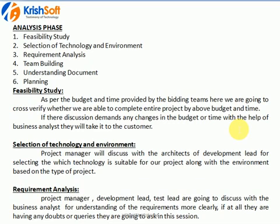Next in the analysis phase is requirement analysis. Once team building is completed, the business analyst explains each and every requirement to the entire team — including the development team, testing team, architects, database team, servers team, and deployment team. Based on this, each team prepares their own understanding document. The project manager or respective lead verifies it and sends it to the client to build confidence that the entire team has understood the requirements.